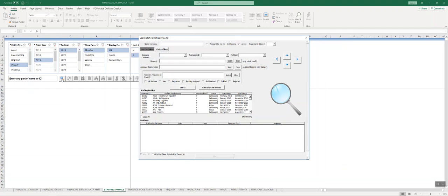As you may know, the standard resource management process in PPM involves requesting resources from a resource pool. Then once the resource manager commits resources to your staffing profile, those resources can be assigned to work plan tasks by project managers. This new capability in this version of XLI allows shortening this process by roughly half, by allowing the project managers to designate the work plan tasks which a requested resource will be assigned to once they get committed or soft booked to the project. I'll go ahead and show you this in action.